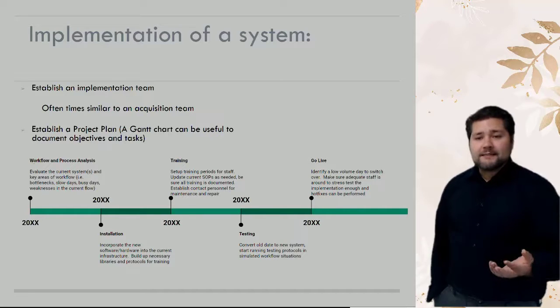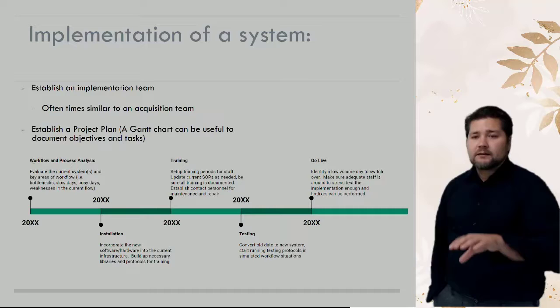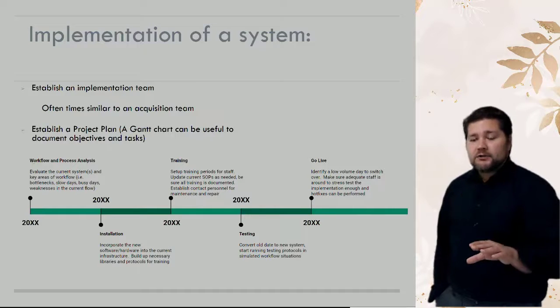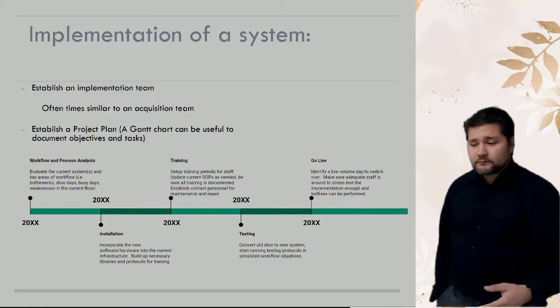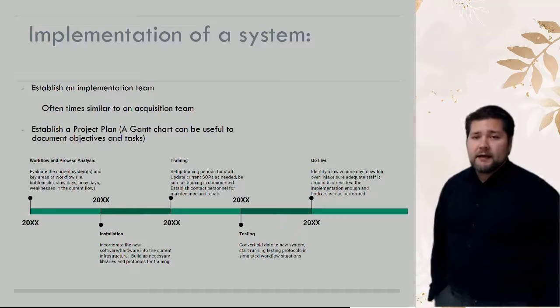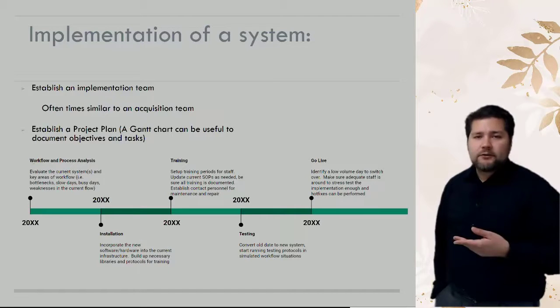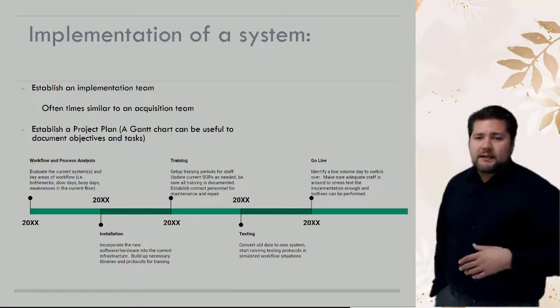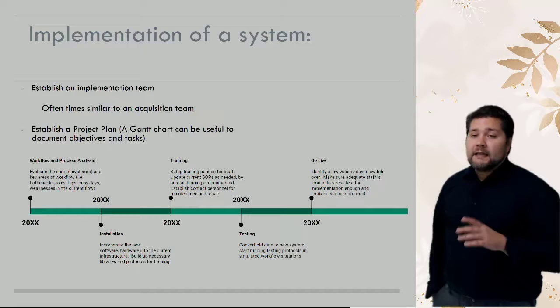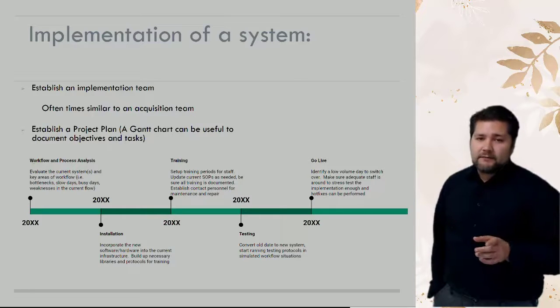You're going to test the system. So now that it's installed, we can start doing some mock demonstrations on your current workflow and see how it handles that. You can run some basic tests, you can build up some mock patients and things like that, and just run through the process and see if there are any hiccups you can get out. And then finally the time will come when you need to go live.